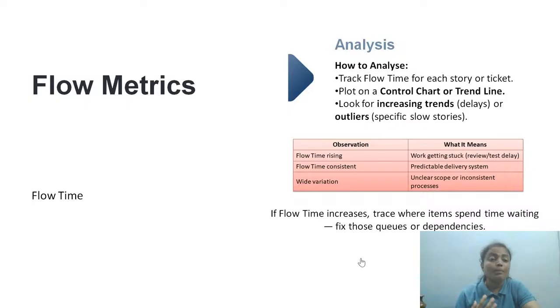Let's make that collaborative decision and involvement to move faster, rather than, okay, I push to review, I will get into the next story. That particular story is staying in review for 3 days in the waiting queue, not even in the in-progress queue. It's in the waiting queue, which is completely unacceptable, right? That's very, very important.